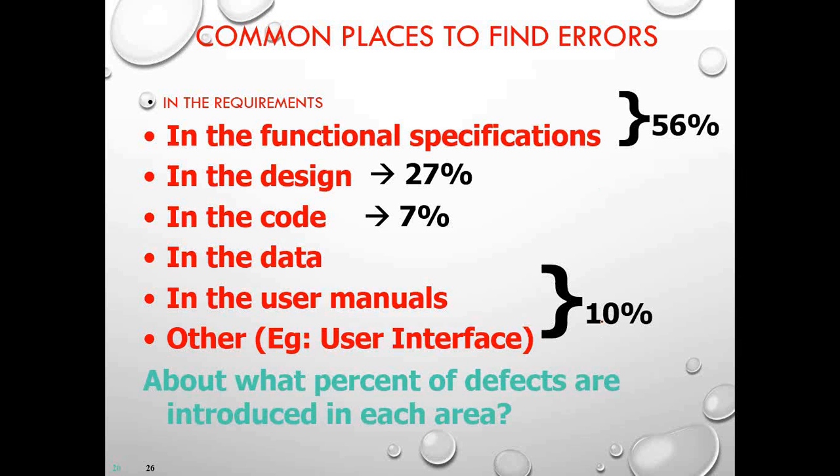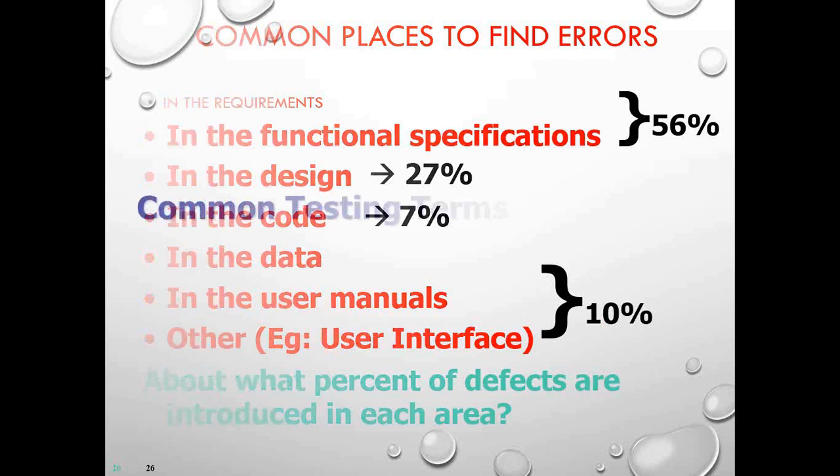Most of the issues are identified at the time of requirements, whether it is a functional requirement or a technical requirement. That's where you identify them. On the other hand, the design is more from the detailed design, where you can find out additional issues. But later on, from the code and the later stages, the errors go lower and lower, because now you have already identified most of the issues in these two early stages.